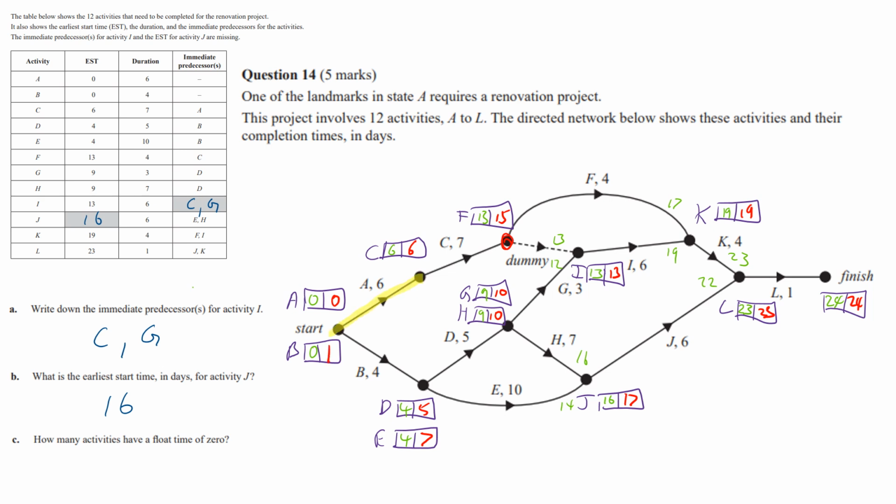So A, C, now F has got a float on it, so we go through the dummy, I, K, L, and if we count them correctly, and again, let's not be a dummy and count the dummy, so that one doesn't count, so it's 1, 2, 3, 4, 5. So our answer is 5, and I think it says here some people erroneously counted the dummy activity, so that's probably where I got 6. Only about a third of students got that right.